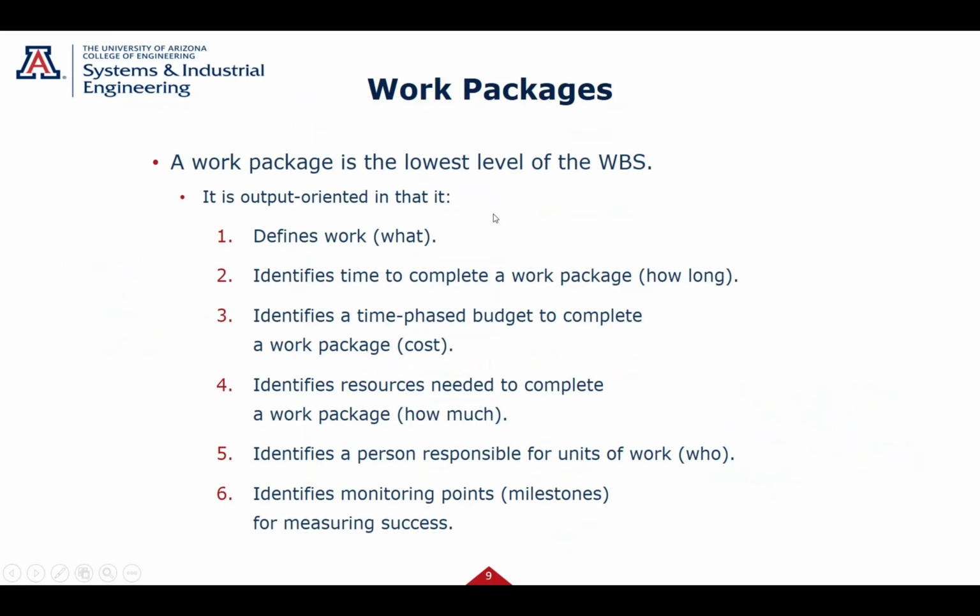A work package, the lowest level, defines what work you're doing, how much time you have, what the budget is, what the resources are, who's responsible for that task, and what some of the milestones are. So now you've broken this huge project down to all these work packages that you can assign to people and you can measure. And this becomes critical, especially on larger projects. And again, we'll get into details so you'll see some of these a little bit better.